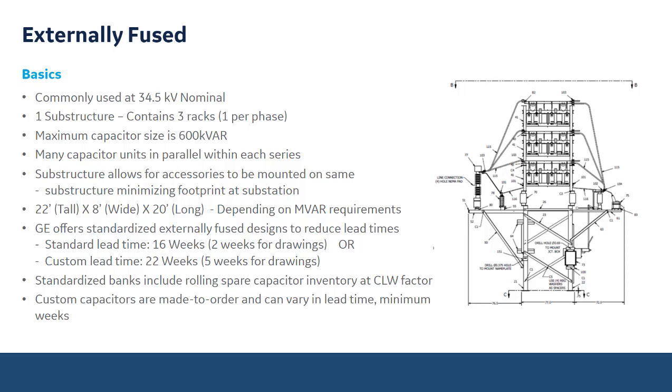GE offers standardized externally fused designs to reduce lead times. So on a standard lead time, and I'm going to share a link later on, which will be a catalog of the externally fused standardized cap banks, that lead time is going to be 16 weeks from placement of order to when that bank will be shipping to your site. And by utilizing a standard lead time, it allows us a couple different things. The drawing lead time will be 2 weeks.